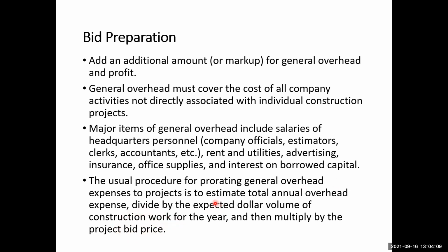So anyway, it is not difficult mathematics, just the common sense that whatever the value of the project, the general overhead expenses may be assigned on a pro rata basis. Okay.